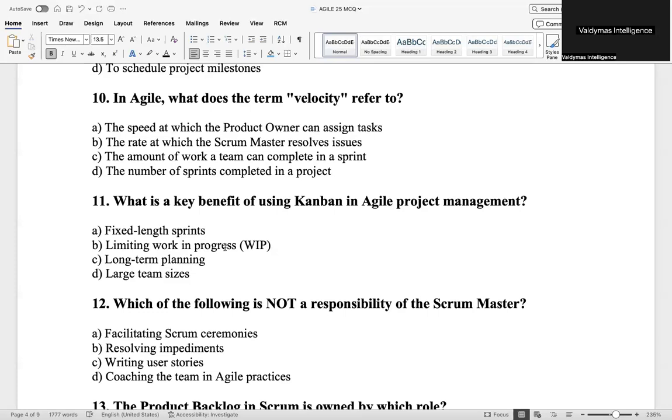So you'll be running on a fixed length sprint, and you'll be using a work in progress limit. The WIP limit will be that we are taking, say, 5 stories every sprint. But the idea in Scrum is that even if we finish the 5 stories on day 3 of a 10-day sprint, you go back and add more stories to it. That's Scrum.